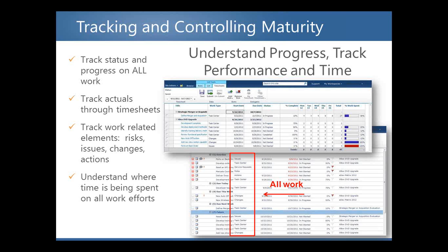Are you looking to include timesheets in your system? Are you looking to integrate with your current timesheet system even? If you do want to include timesheets in the system, you'll want to make sure that it's been configured to include the proper categories needed to reflect your business needs. If you're reporting actual hours worked on a weekly basis against projects, do you want them to complete their time daily, or at the end of the week? All of these questions will help define your timesheet configuration.